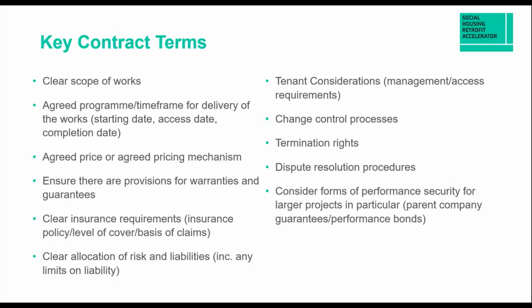We would always recommend engaging with insurance advisors as early on in the process as possible, really, so they can advise on this. In terms of retrofit works, we find that one of the key insurance requirements is to do with existing structures. So what happens in the event that, let's say, the contractor damages the roof installing some solar panels? So who insures that risk?